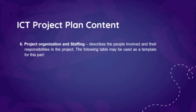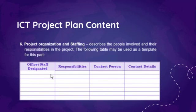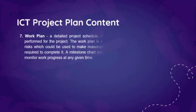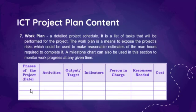Next, we have Project Organization and Staffing. If you are working in a group, you can include designated roles, assigned responsibilities, contact person, and contact details. If you are doing it individually, you can skip this part. Next, you have the Work Plan — a detailed schedule of your project. For the planning phase, list what the activities are — perhaps meetings and brainstorming — what the output or target is, and what resources are needed and at what cost.